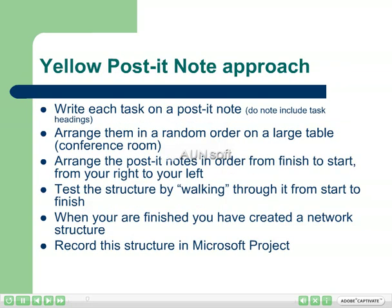To use the yellow post-it note approach, start by writing each task on a yellow post-it. You don't need to include the category heading tasks. Arrange them in a random order on a large table — you could use a conference table for this. Take the last task to finish and place it at your far right, then work backwards from the end of the project to the front, arranging the yellow post-its from right to left.